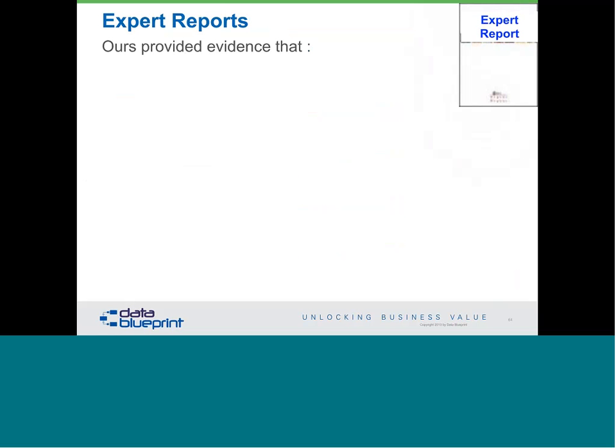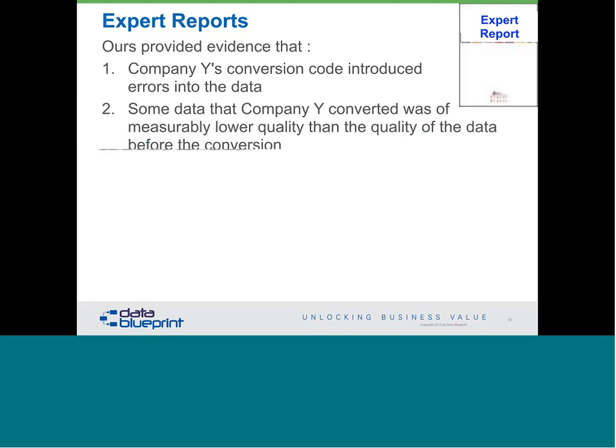We had a series of expert reports that proved that company Y's conversion code introduced errors into the data. Let me just stop here for a minute, because if somebody says they're going to convert the data and they haven't looked at it, and they tell you how long it's going to take and how much it's going to cost, they're making numbers up. On the other hand, if you have somebody convert your data and you don't take a baseline sample of what that data looks like before, how are you going to defend yourself against the claim that your data is of poor quality? Again, a very real issue.